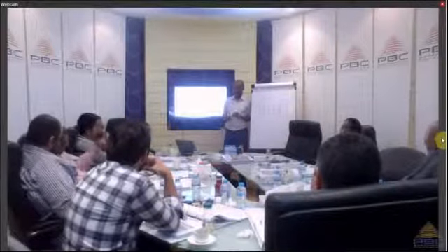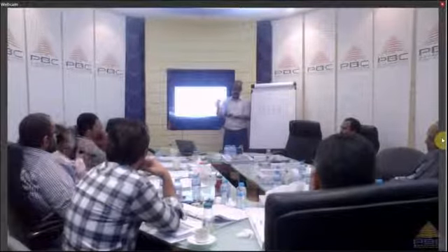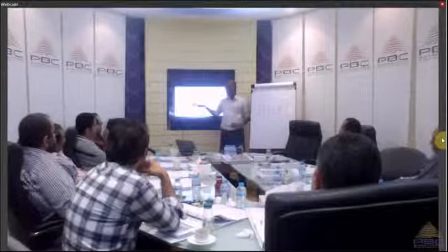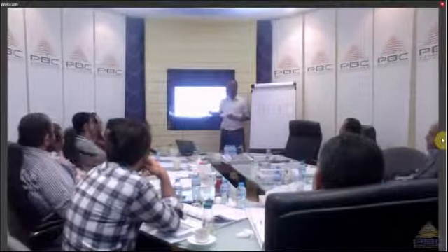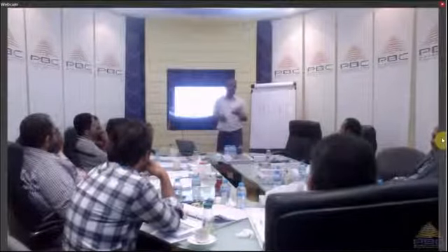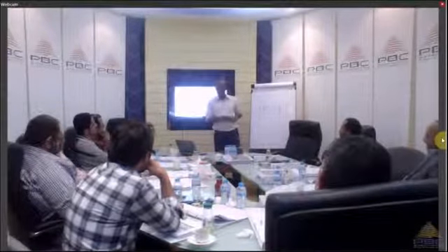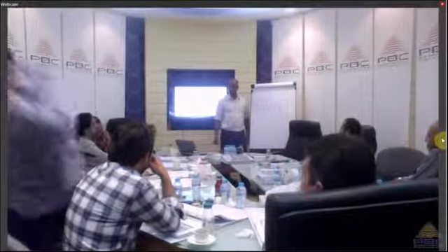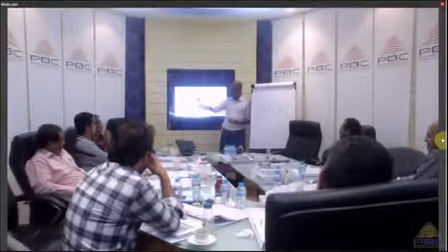Right? Block work process. Once you finish the block work, this is called a what? Finish to finish, finish to start. So the most common one is finish to start, right? So it means I have to finish this completely before I can start this one. Okay? And then you have the other relationships.